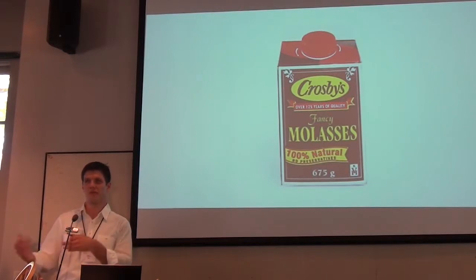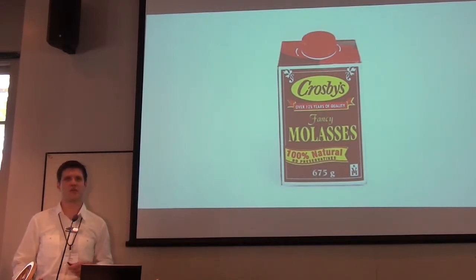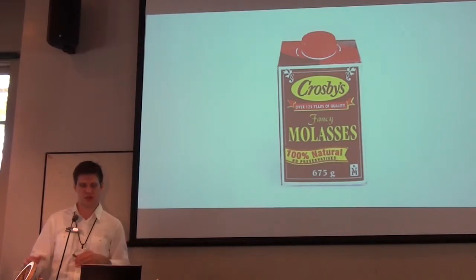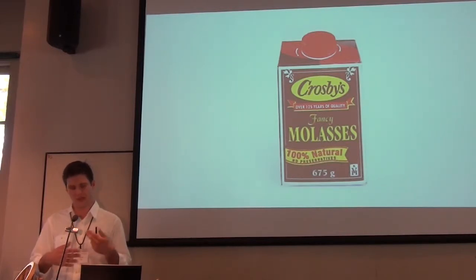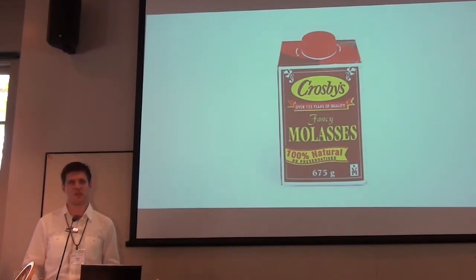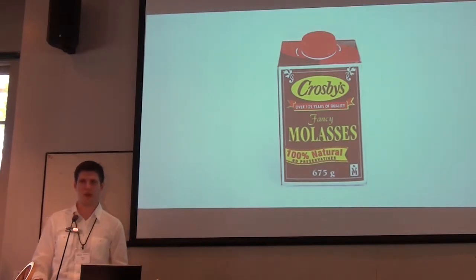So mostly Francois would lose about a whole day of work just giving her feedback and integrating her work with the project. That way, she couldn't iterate really fast and she couldn't improve things at a good pace. The only reason it worked for us is that our art needs were much lower than our game development needs, for example. So we were able to manage finishing it, but it never scaled at all.